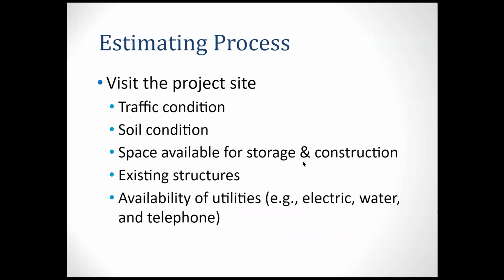So after you form the team and you have your plan, next you are going to visit the project site. Right now, most companies are using drones to do the site visit, right? Because the drone can fly over the site and also look around the surroundings, so you can do a quick site visit. But in some cases, you also need to walk over it in person, and you may need geotech teams, geotech technicians, or geotech professionals to get the soil conditions. That is very important. Maybe the owner-provided soil condition is not accurate. So that puts you at risk, right?